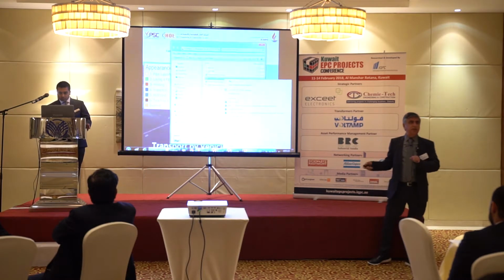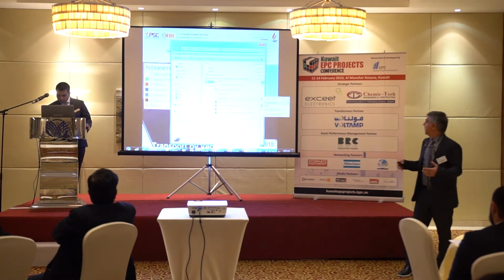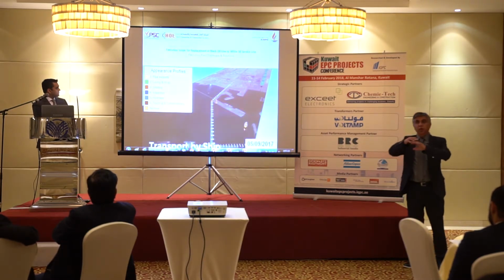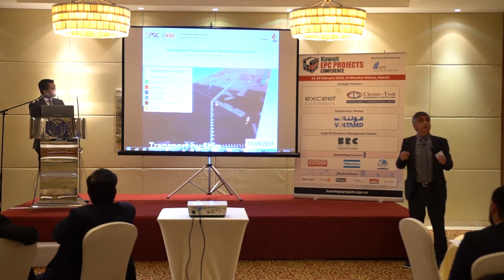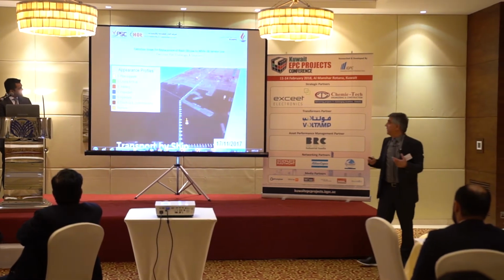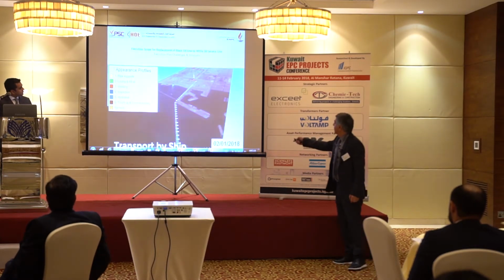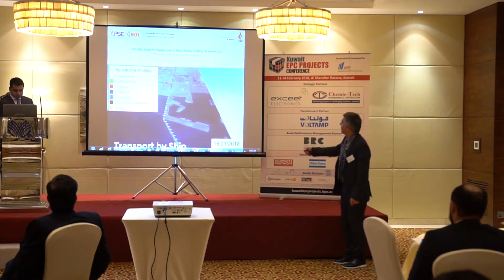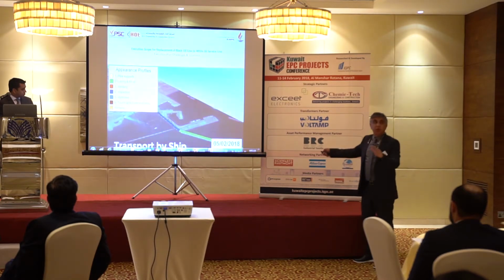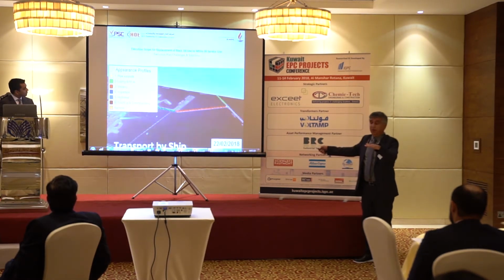During this planning stage, when we sat with our engineers and the client engineers and had a brainstorming session, this visual animation gave us an overview of the project. It opens your mind to think of outside-the-box solutions. So we brought this solution. What we did, actually, is say that we are not going to use the vehicle on the road. We are going to use a tugboat instead, along with the barge.